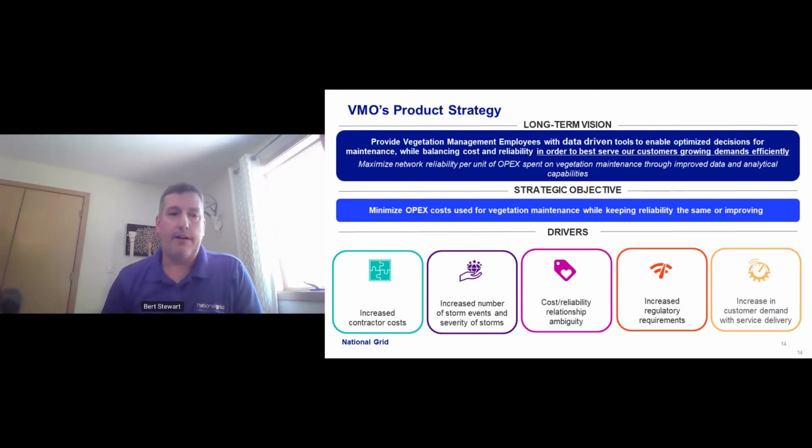Today, that is not true. When our qualified workers are leaving the industry, they're gone. It's very unlikely they're coming back. So the ability to retain, recruit, and maintain the necessary complements that our contractors need to deliver our vegetation management programs is a huge undertaking today, like it has never been. So that obviously is driving our costs. As a result, in our Massachusetts jurisdiction, we've seen that we've had to make tough decisions on our maintenance pruning program, whereas we were deferring in one year maybe 100 miles out of our work plan. And then the following year, maybe now we're deferring 200 or 300 miles. And then the following year, 400 miles.